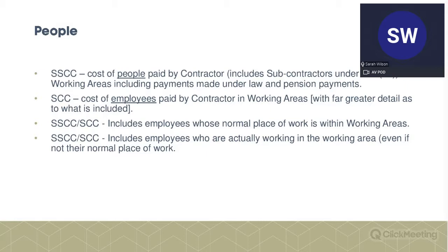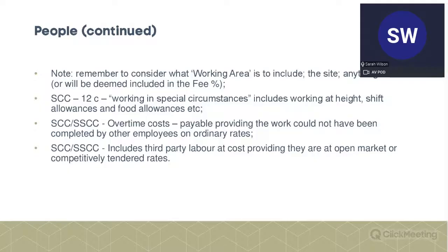So, this could cause problems working from home. If you have normally been working on a project, but you're working from home because of COVID, then you could probably be charged. If you're not normally working within the working area, but you're doing work on the project, then there is an argument that if you're working from home, you're covered within the OHP, so the fee percentage for this work, rather than this people cost.